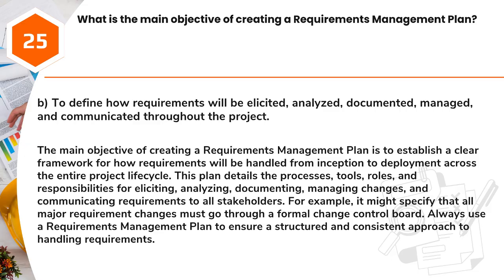This plan details the processes, tools, roles, and responsibilities for eliciting, analyzing, documenting, managing changes, and communicating requirements to all stakeholders. For example, it might specify that all major requirement changes must go through a formal change control board. Always use a requirements management plan to ensure a structured and consistent approach to handling requirements.